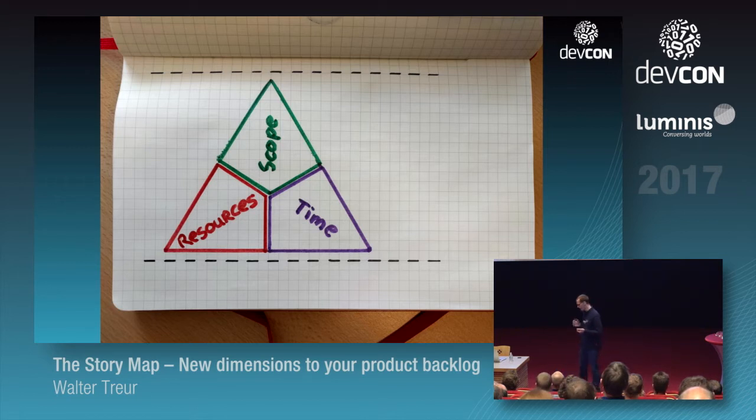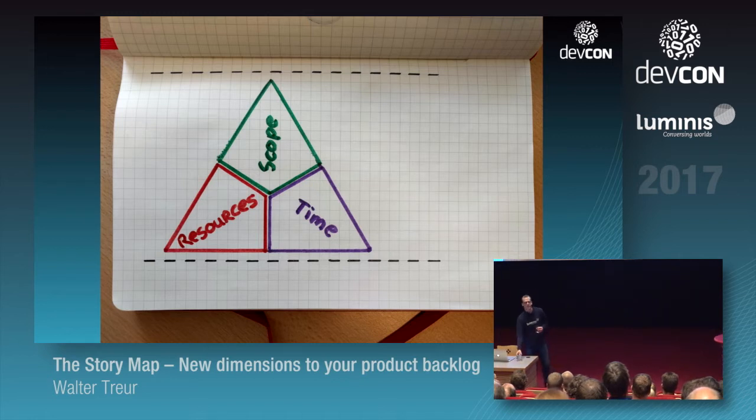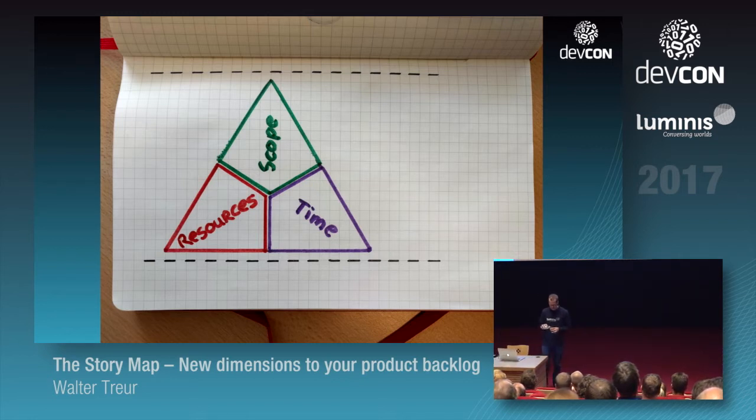But at the end, when you have a late project and you bring more people into the mix, your project is probably going to be later, because these people need to be brought up to speed. It's going to take time from the others. You've heard the saying, bringing more people to a late project usually makes it later. So they are related to each other, but it's a bit tricky.